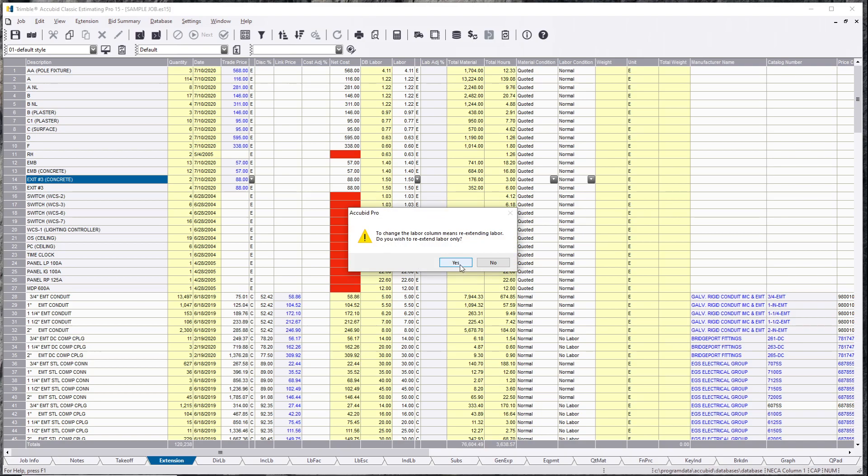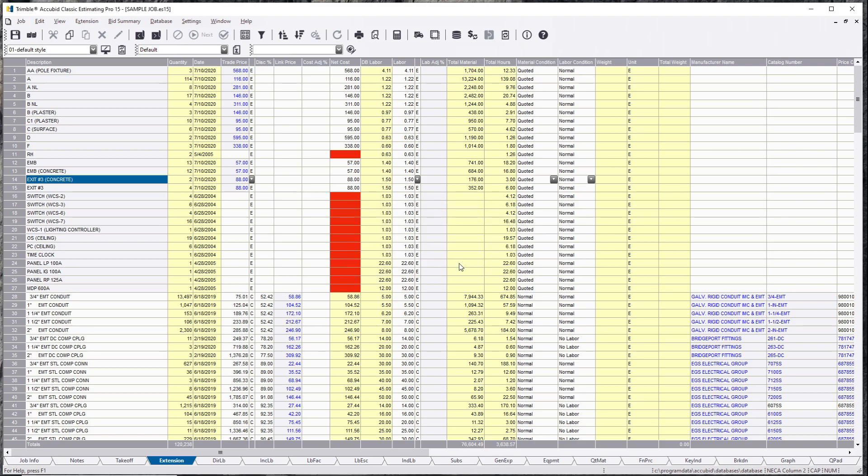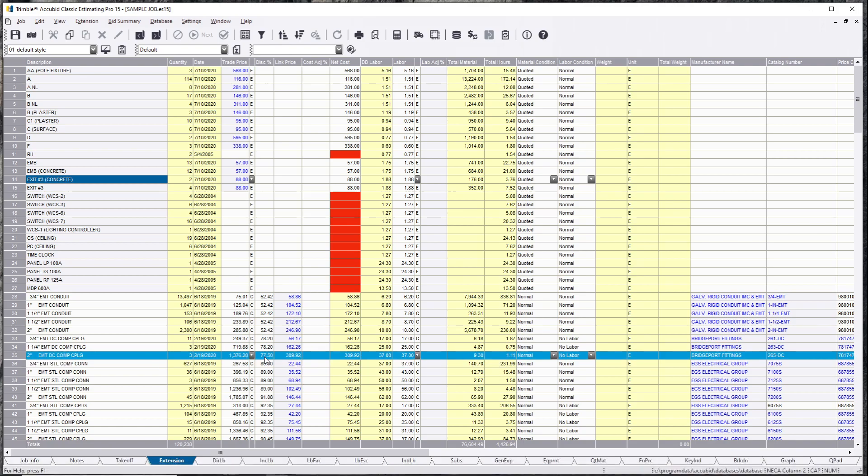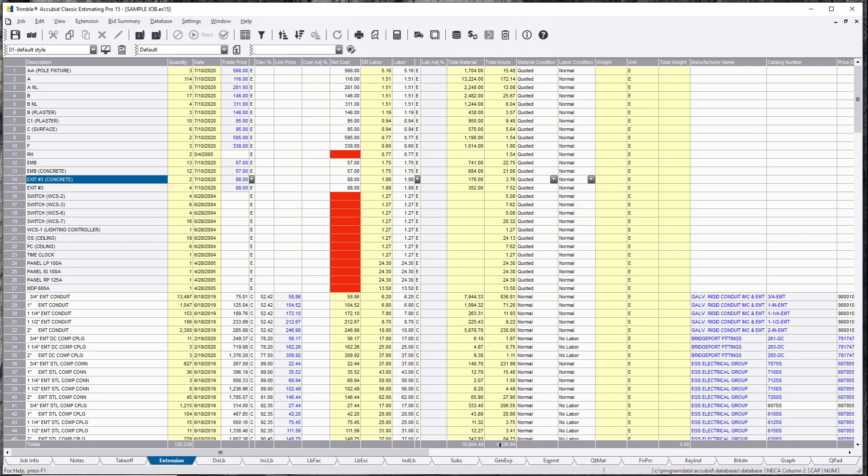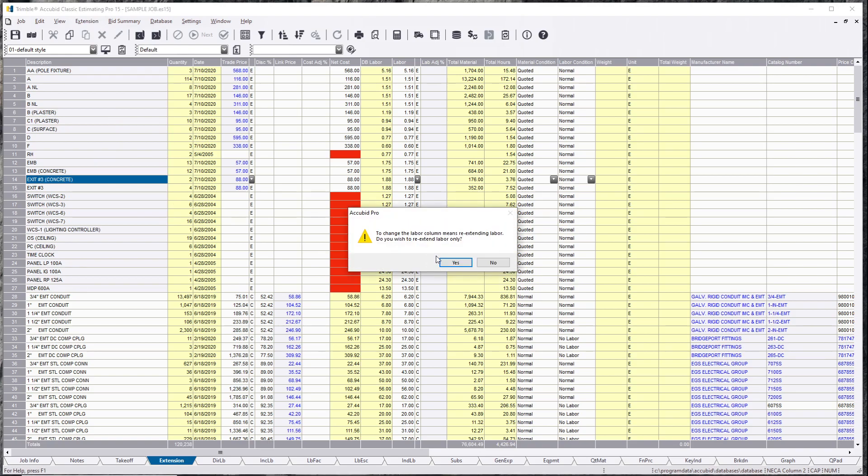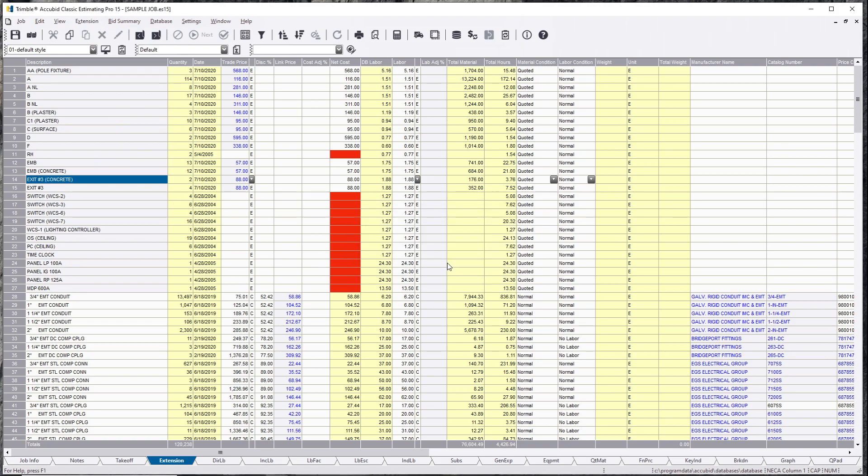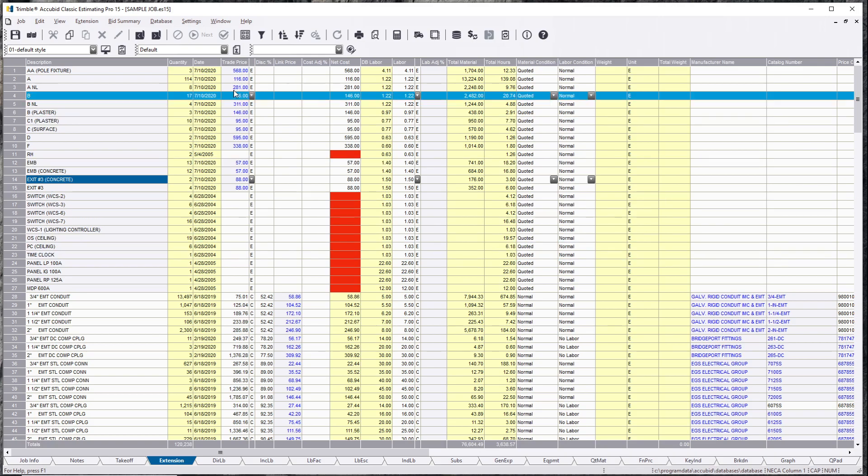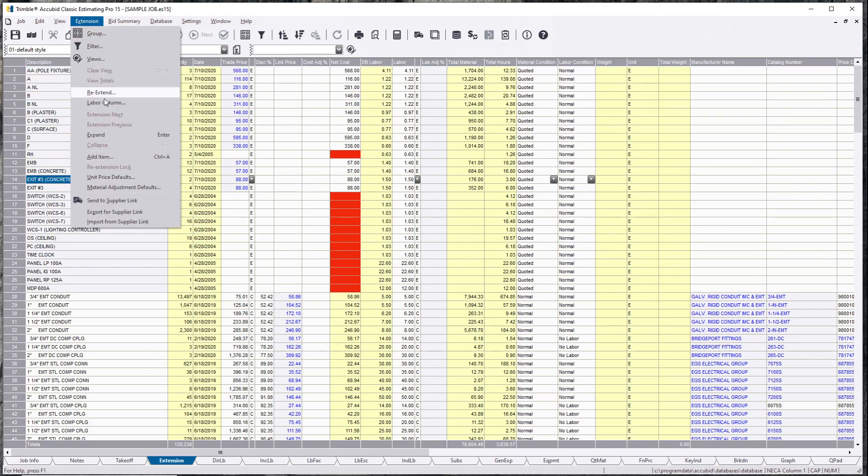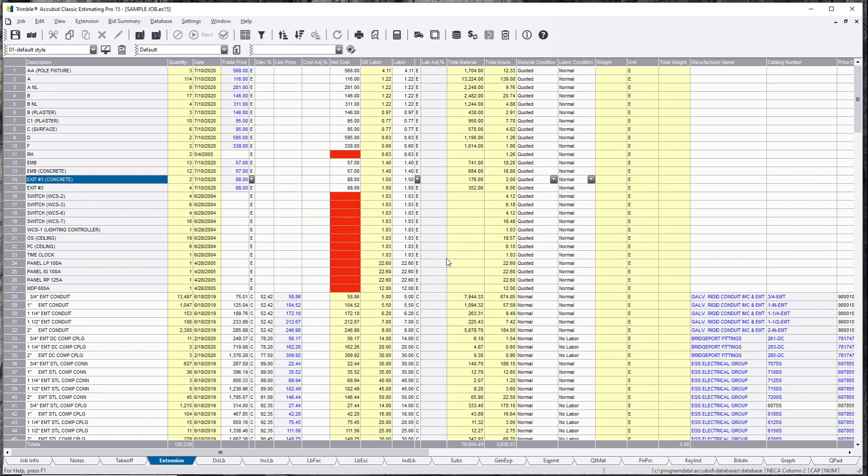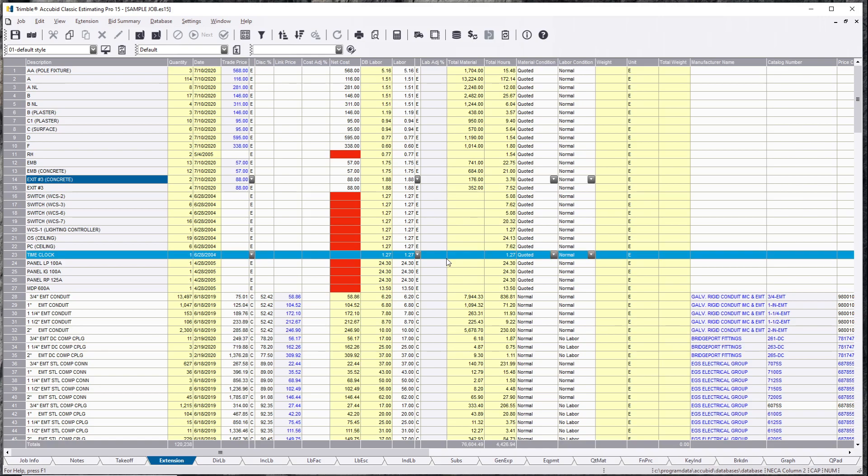I believe we're at 3,300 hours, now we're at 4,400 hours. Let me double check that really quick. 3,638 hours, and then I'm going to switch this back to NECA column 2. 4,426 hours. You just added 788 hours to your job, and unnecessary.